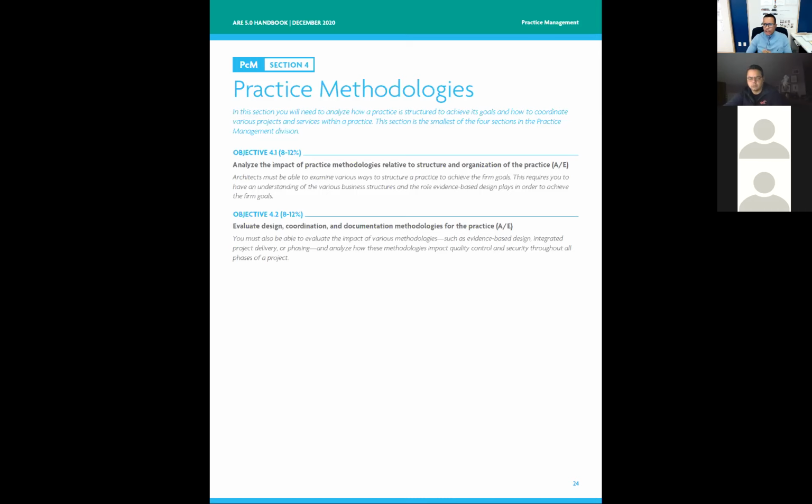Also, financially, you get to play priorities. Well, guess what? We have two projects. One is due in 6 weeks. Another one is due in 4 weeks. The project due in 4 weeks is going to pay us $30,000. The project that's due in 6 weeks is going to pay us $10,000. Doesn't it make sense to get all hands on deck to finish the project in 4 weeks? That's important, and even finish it before, because that's going to cover overhead, profit, and all that stuff.